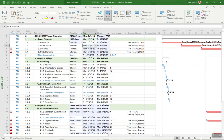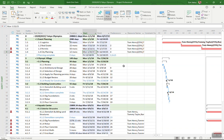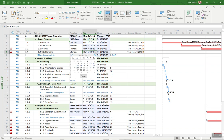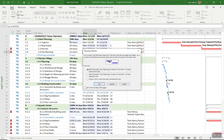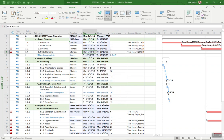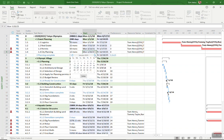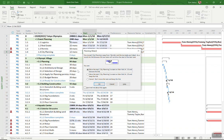If I come in here and change a date, let's say I change the start date of city planning, if I come in here and say instead of January 2025 it's February 24th, the planning wizard is going to prompt me. It's going to say you've moved a task away from a task that it's linked to. Do you want to move the task and remove the link, which makes sense right you're overwriting the scheduling engine. Do you want to move the task and keep the link, kind of counterproductive because that task that it's linked to is not driving the start date. Or cancel, don't move the task and keep the link, basically just you're doing something wrong don't do it again.